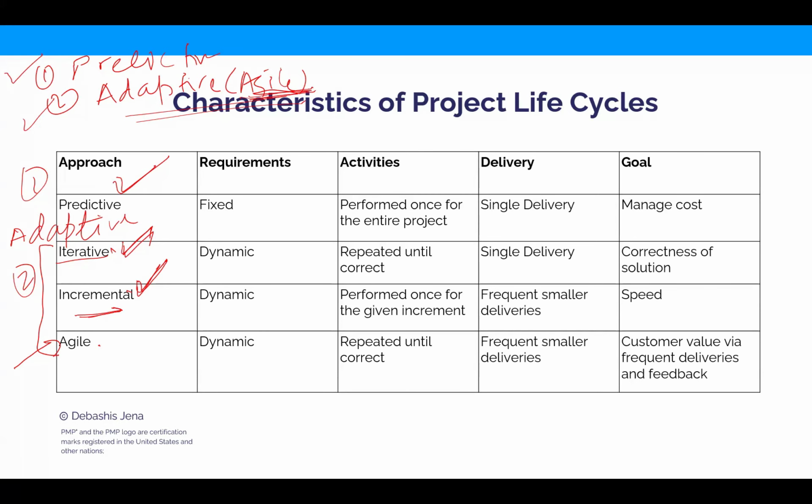I don't have a question, but I need to add a sample. Correct me if I'm wrong. On our terminal, we have 40 storage tanks now. When we built this, we started by building 14 tanks. After building 14 tanks, we started our operation, we started our business. And when we are operating, we started on the next phase. So this is a part of incremental, right? Yes, this sounds like incremental. That's right.